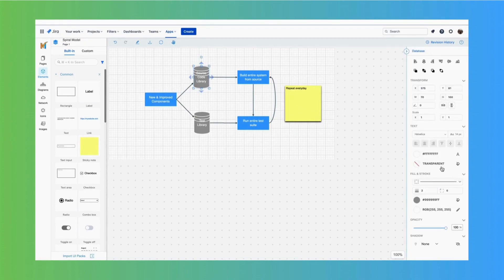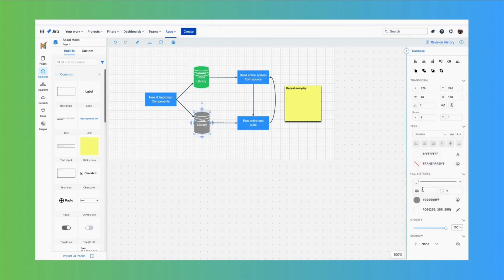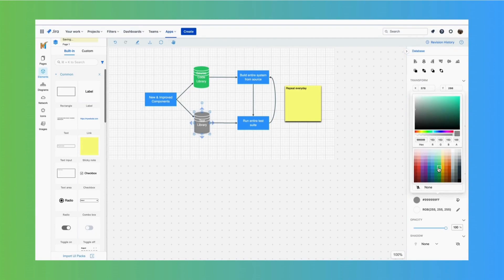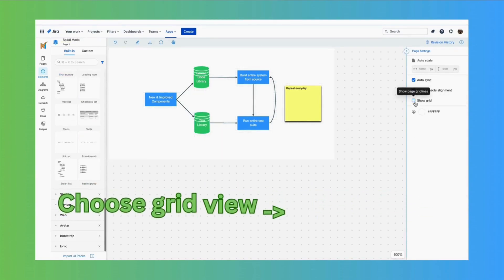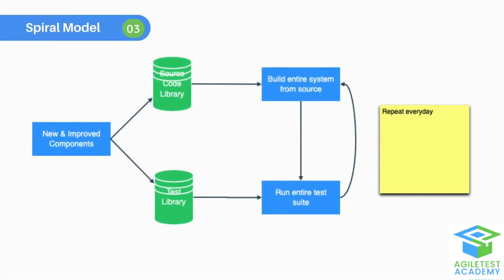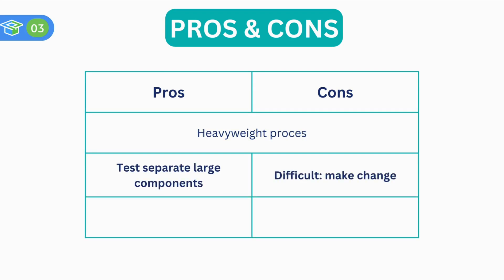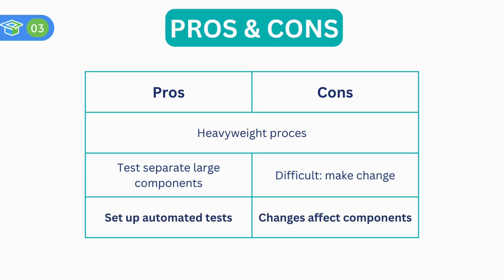Spiral development is widely used to develop new versions of large systems. Spiral model is a heavyweight process due to its characteristics. Large components can be developed and tested separately, but it is difficult to make changes to the architecture. Spiral model is good for setting up a comprehensive set of automated tests, but small changes will affect many components.